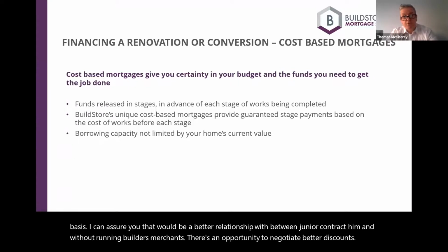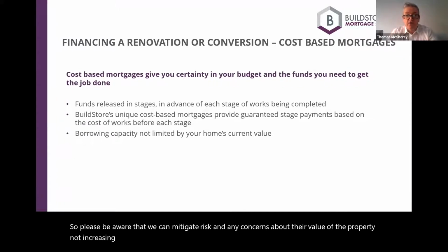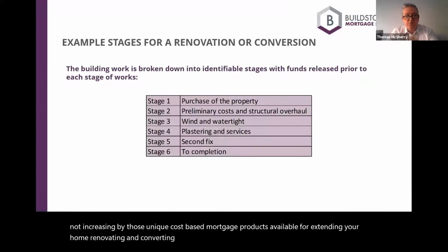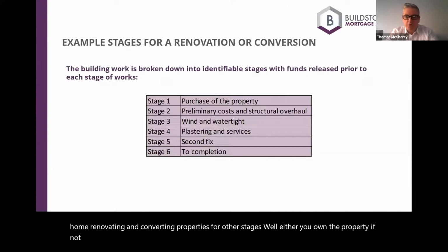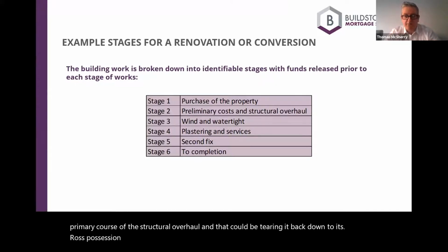So please be aware that we can mitigate risk and any concerns about the value of the property not increasing by BuildStore's unique cost-based mortgage products, available for extending your home, renovating and converting properties. What are the stages? Well, either you own the property, if not, we're purchasing the property as stage one. And the initial stage would be that preliminary cost of the structural overhaul. And that could be tearing it back down to its rawest position, removing windows and doors and underpinning if there's structural defects.